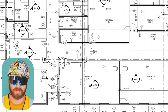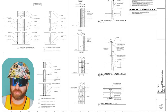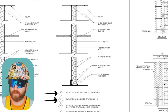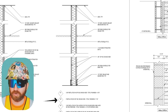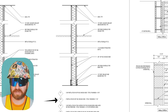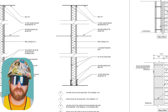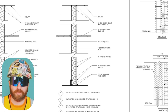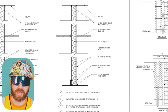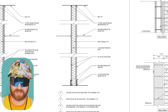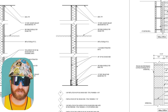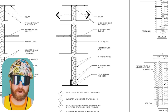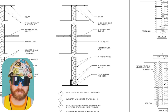On sheet A3.3 wall types, I'm looking for K1 and K2. K1 is a 3 and 5/8 inch metal stud with gypsum board on each side, total thickness 4 and 7/8 inch. K2 is a 6 inch metal stud with gypsum board on each side, total thickness 7 and 1/4 inch. Looking at the visual aspect of these walls, we see they go all the way to the underside of the deck — a full-height wall — with metal studs, sound insulation, gypsum wall board on each side, and a note saying 'base type, reference the finish schedule.' What this detail doesn't show is the mechanical, electrical, plumbing, and fire protection piping that would be above the ceiling and potentially go through this wall — we'd have to reference the other drawing disciplines. Also, if this is a fire-rated wall, there are certain requirements to caulk and close up penetrations when duct and piping go through.